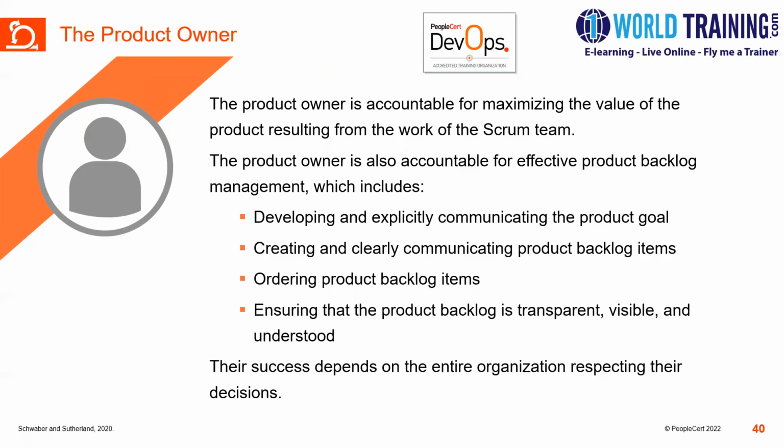Also, the product owner is accountable for effective product backlog management, which includes developing and explicitly communicating the product goal, creating and clearly communicating product backlog items, ordering the product backlog items, and ensuring that the product backlog is transparent, visible, and understood.